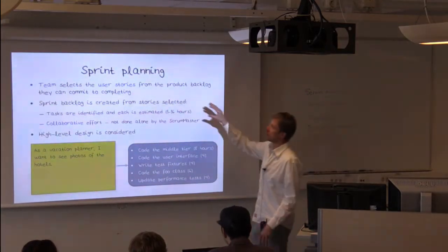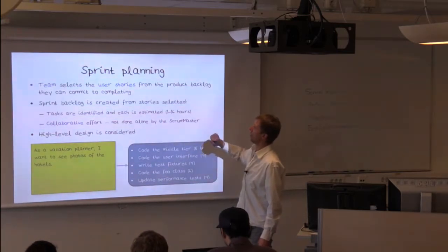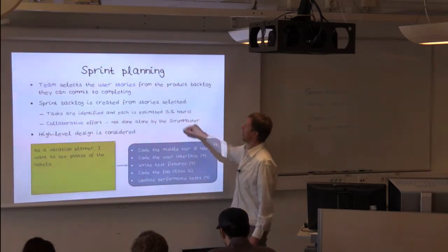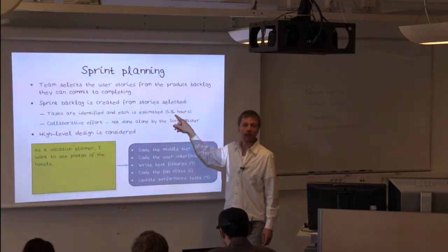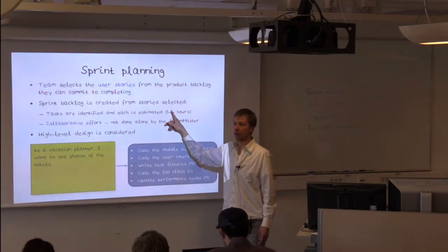So again, the team selects user stories from the product backlog, and tasks are identified in order to pull off these user stories. Tasks cannot be too big. We're going to have a cap here of 8 hours for one task.